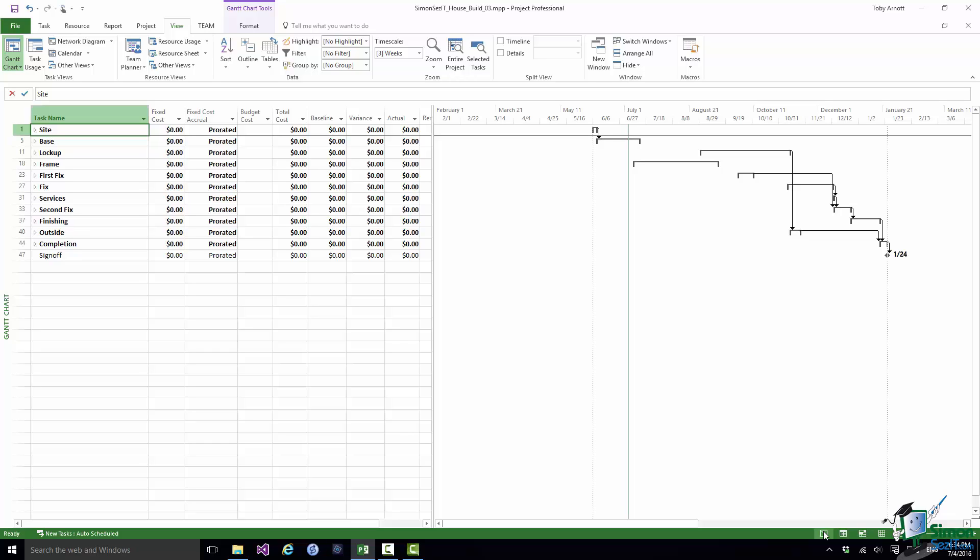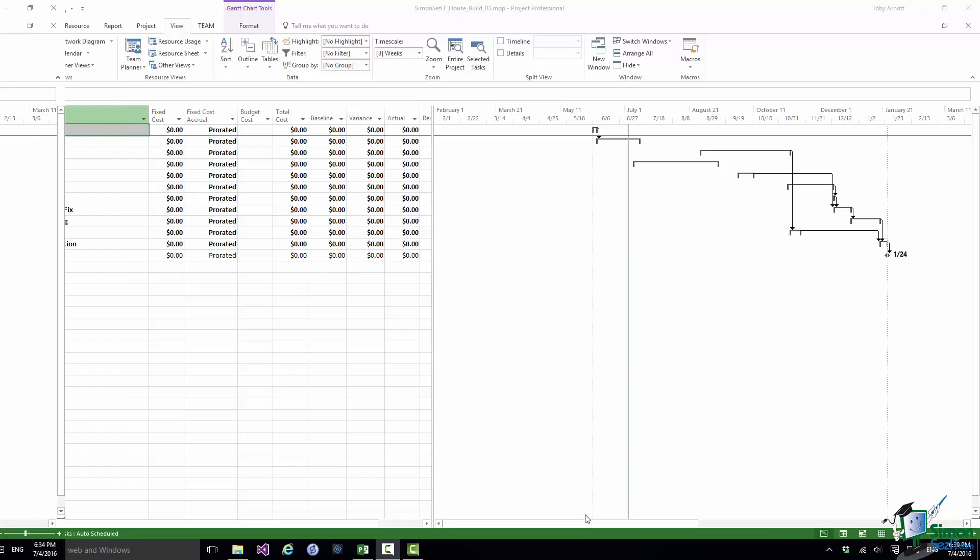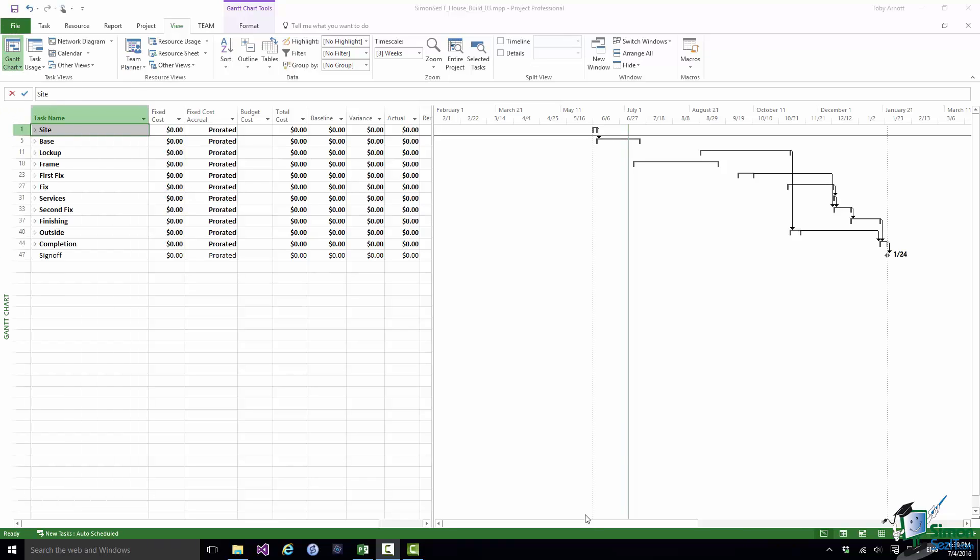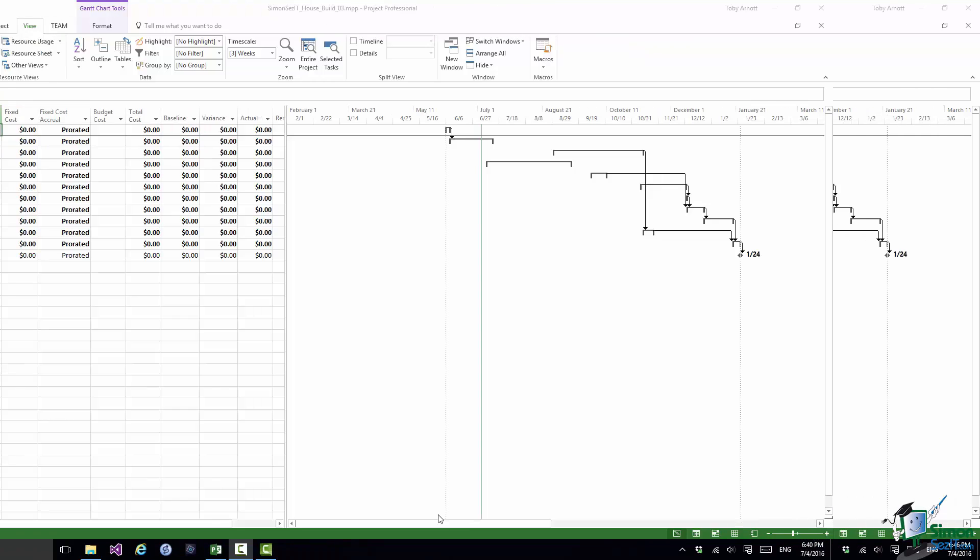Rather than do all of those, I'm going to take one element and show you how you might deal with one element, and then the other elements will be dealt with in an equivalent way. One thing that I must make very clear at this point is that you shouldn't confuse budget costs with baseline costs. A baseline is a saved copy of a detailed schedule at a point in time. Budget costs are assigned at the project level. Although we can compare the budget costs with our actual costs in whatever categories we've set up, it's not the same as comparing progress actuals with a baseline.